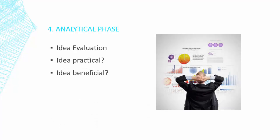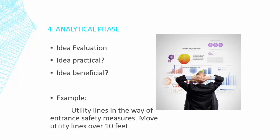Once we push that through into the next phase, we'll go into the analytical phase. The rough ideas are evaluated for implementation in the project. The ideas that are later discovered to be impractical, not beneficial, or not cost-effective in implementing are discarded. Further development will be placed on the ideas that present the most value improvement to the project. Let's say the example of the blast-resistant windows has made it through into this phase and we have now discovered that the proposed utility lines will be in the way of where the barricades and bollards will go. Fortunately, we're in the design phase and all we have to do is move that utility line over 10 feet, no problem.